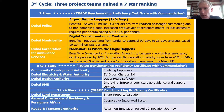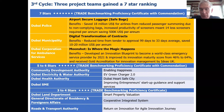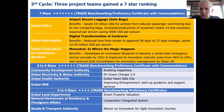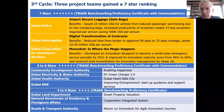For Dubai Municipality, their project was reducing tendering time from issuance to contract award. They reduced the average time from 99 days down to 33 days, saving the organisation between 10 to 20 million US dollars per annum. Dubai Corporation for Ambulance Service is trying to be the most innovative ambulance service in the world — developing an innovation blueprint with an objective to achieve that by 2021. They've already improved their innovation maturity score from 46% to 64% and received gold accreditation for innovation management.